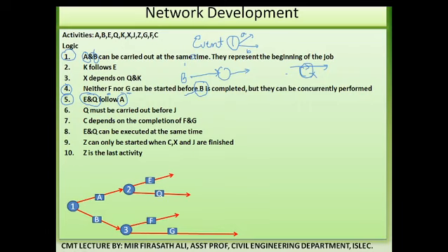Now look at here, K follows E. What does it say? K follows E. What does it mean? After activity E, which activity comes? K activity comes. So insert K activity over there.